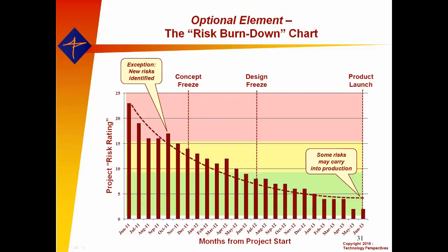If it pops up, as I showed on the 5th bar from the left, that indicates some new risk or concern has come along that was unexpected, and that might trigger either management involvement, or at least the team would need to do some firefighting or mitigation plan for that new risk. I think I covered the rest of it later on in my talk.